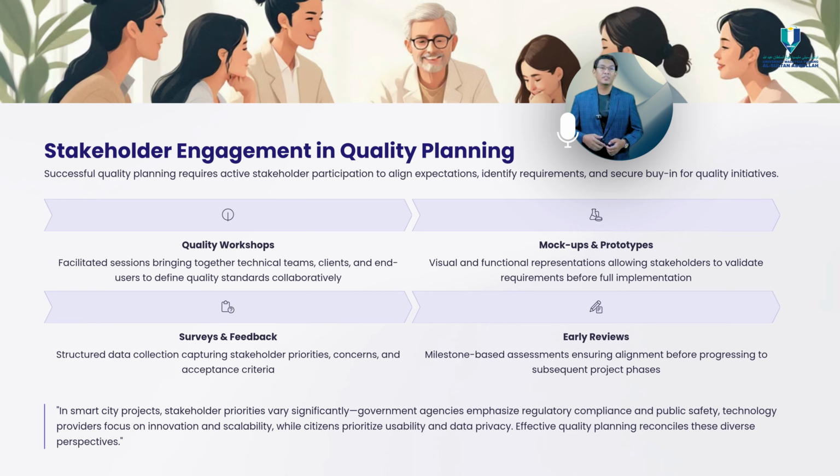Now, engagement activities may also include workshops to define quality expectations, mock-ups or prototypes for stakeholders' review, surveys to capture user perspectives, and early quality gates for inspection and feedback. By integrating stakeholder inputs, the quality plan becomes more robust and achievable.